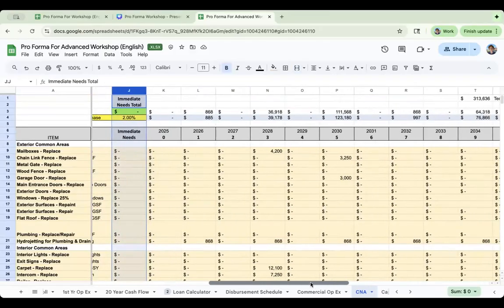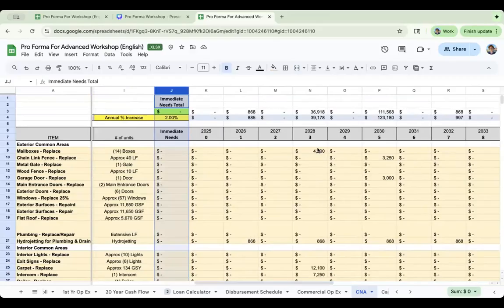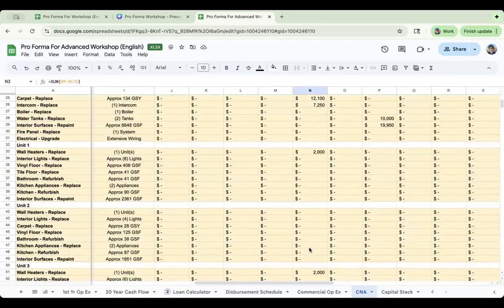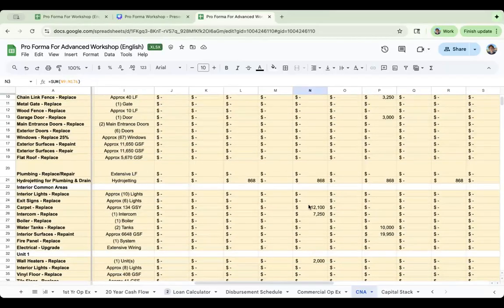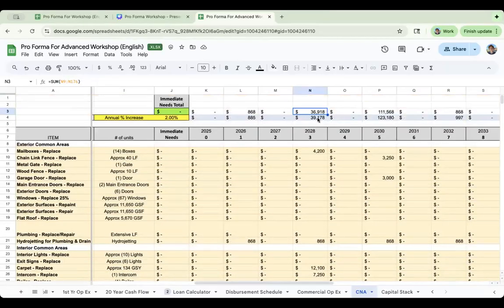A couple other things I just want to point out while we're looking at this. So, you're looking at it year to year, and we see in year 3, the estimate is that the cost will be $36,000 for all of these various repairs. A lot of wall heaters getting put in place. But then also, because this is in the future, we add inflation. Obvious to do, but just seems really brilliant to me. So you'll see this is now the inflated price. So it's accounting for 3 years from now. If we expect 2% inflation, which is perhaps incorrect, it'll cost this much.